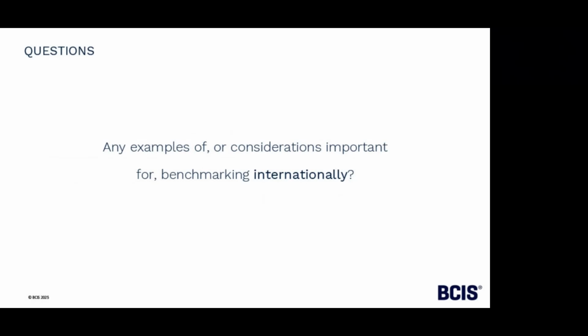But used at the very highest level of a cost, just to understand what it may cost to build in one location over another. But again, I echo what James said, that it has to be treated with very much the usual professional judgment. Just to say that you can pick up a cost and move it to another location isn't correct. You can't necessarily. It's a buildability thing. You may not be able to physically construct something that's in one country in another country because of various reasons. So yeah, benchmarking internationally has its own issues around making sure you're following the right standard format of coverage rules, etc. As James said, currency, all those sort of factors come into it.